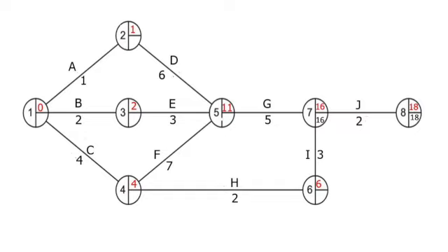Right, now in terms of node 6, what we do is we do our 16 and we minus our 3, and therefore we'd get 13 weeks. Now that actually means that there is some slack, and slack refers to the amount of time that an activity can be delayed without delaying the project completion time. So that slack is 7 weeks, as that's the difference between the EST and the LFT, which suggests it is not critical. Now for node 5, we'll do 16 minus 5, which will get us to 11.